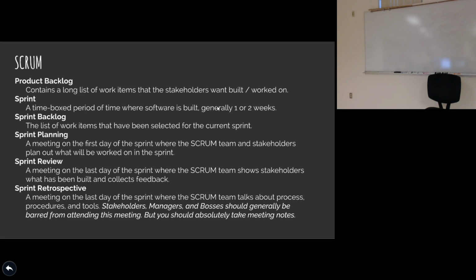So this is very limited. You only want a small number of people in there, and generally, let's say your company has 5 teams, you shouldn't have 5 retrospectives with more than 1 team in the room, because everybody in the room needs to get a chance to speak and be heard, and to talk about what are those things that we could do better, what are those things that went poorly, and what are those things that went well. So that's where that fits in the process.